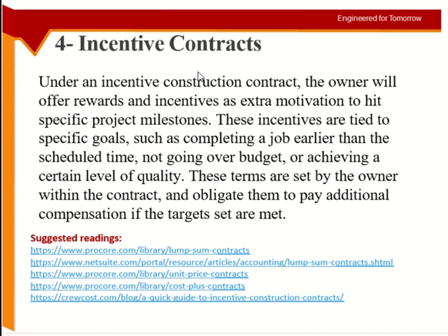So, like in the previous example, he would want the cost to go higher, right? Because he is getting 10% of it. Or even if you say, okay, you have a fixed fee, you will give me 20,000 BD. Whether I do the work for the remaining 80,000 BD or I do the work for 200,000 BD, I will still get 20. So there is no reward for me to do the work with low cost.